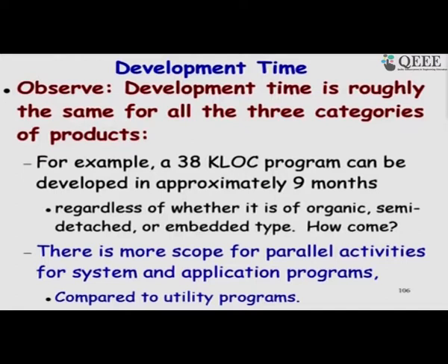But now in COCOMO 2, we have different sets of expressions. Initially we take the function points, later on we take the lines of code, and also more parameters are considered later on to get more realistic estimates. So, to answer the question in short, the estimation is done throughout the life cycle. It starts at the beginning of the project where we get a very rough estimate, and the project manager keeps on estimating and revising the plans, getting more and more accurate estimates.